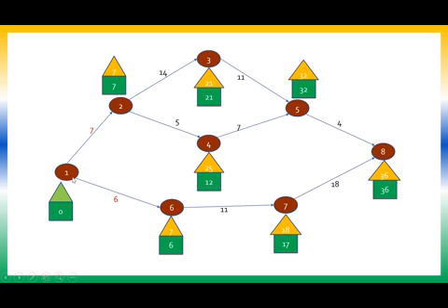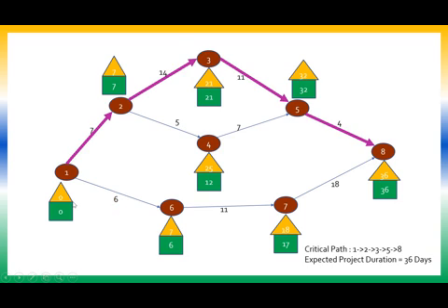Once again here I have two possible inputs. 7 minus 7, 0 is one input. 7 minus 6, 1 is one possible input. So I am supposed to take the minimum. So minimum out of 0 and 1 is 0. Right?